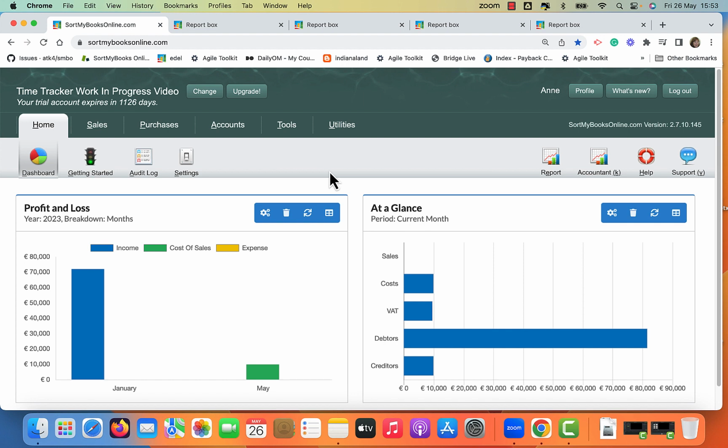And then there's sick pay that you should be considering as well, because we have to start paying sick pay, and within 3 years it'll be up to 10 days of sick pay. So you might want to put in something for that also. But what I'm getting at is the cost per hour of your employee. You need to factor that in.